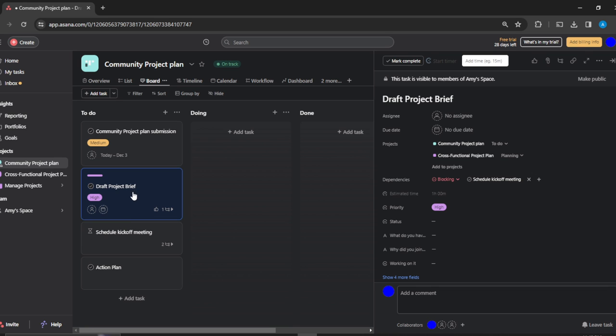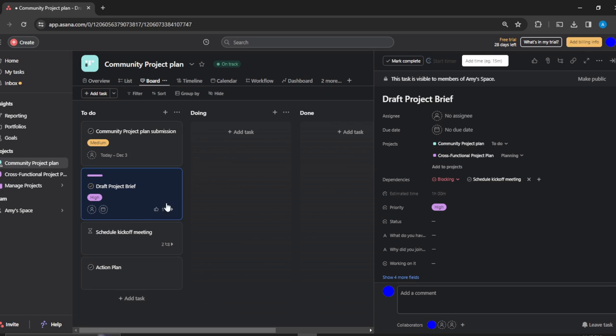To schedule the kickoff meeting, you have to draft the project brief. Both of them are now linked. This is just how you can link tasks together in a project on Asana.